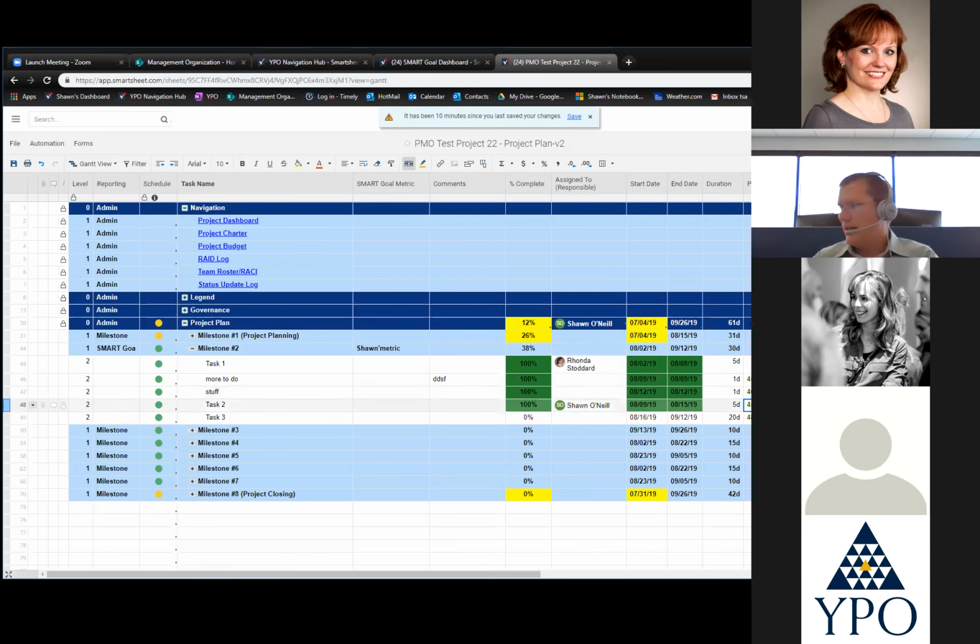Now, if I wanted this task here to take place after that, and it has stuff that depends on it, so like the next line below has a predecessor of it, notice that both of these are going to move. So we'll put 47 in there. And so now those have all pushed out so that they stay in sequence.